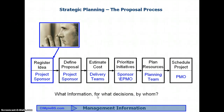We are going to use the proposal process as an example of the request workflow development and delivery approach. Keep in mind that this five-step process should be applied to every business process to be supported by the HP PPM tool, including project management, resource management, risk management, and any other cross-functional, collaborative, repetitive processes. Each of the five phases should be completed and integrated into an end-to-end framework prior to initiating the next phase for any step.